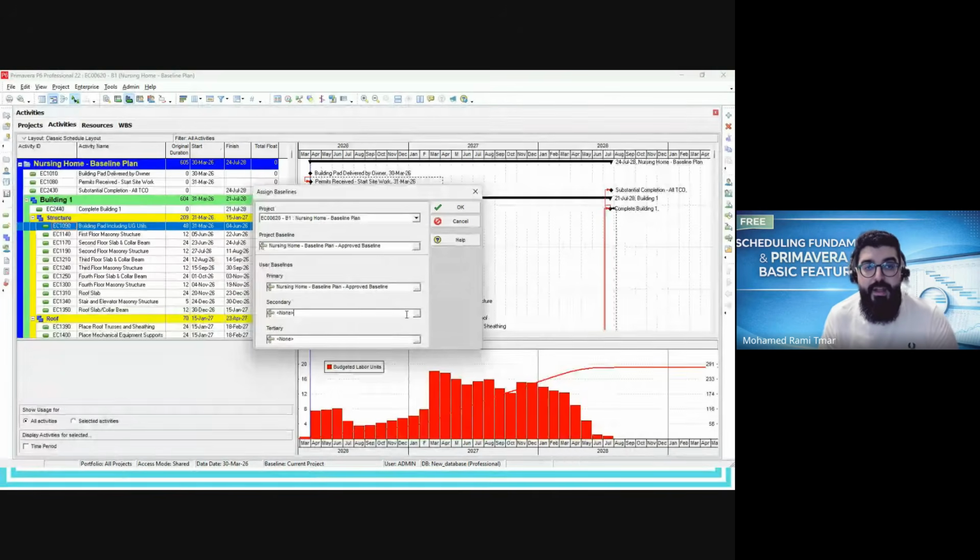Okay, and in a big and global company, there is engineering management software. In this software, you will have the list of deliverables, and the discipline lead will go to the software to update the status based on the rules of credit, where we are exactly.